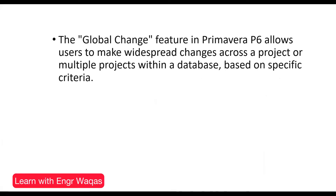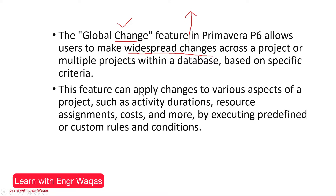Global Change is a big feature in Primavera P6. It allows users to make widespread changes across a project or multiple projects within a database. When you hear 'Global Change,' the key word is 'change' — it is going to change something in your database. The feature can apply changes to various aspects of a project such as activity duration, resource assignment, cost, and more.